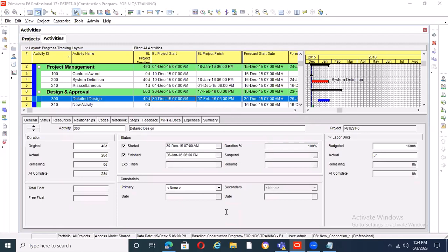That's why you write letters. You have project letters that you write, telling your client what the issue is. You have it dated and signed, and they receive and acknowledge. When you drop letters, you say acknowledged, received, letter received by me. You stamp it and you collect your copy. It's evidence. So you know how projects run. So you don't bother yourself, just keep doing your job. That's it, and that guy will value you.